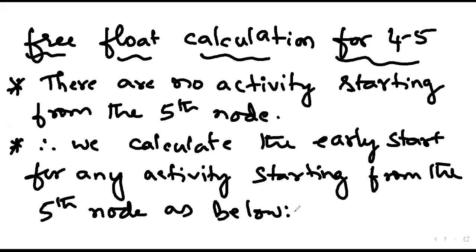It's the same thing. Okay. So we have to consider the early finish for all the activities that finish on the fifth node. And the one that is maximum will be considered as the early start for the activity that starts from the fifth node.